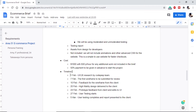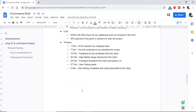The project timeline: on February 1st, 2021 we start research. By February 7th we complete the wireframe and submit for review. The client may take a day or two to approve, so wireframe feedback is due by February 10th. We start the high fidelity design and complete it by February 20th, then take high fidelity feedback by February 24th. User testing starts February 27th, and by March 5th we deliver the user testing report and exported components. This completes the project timeline and the brief.